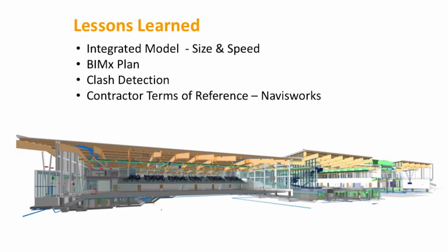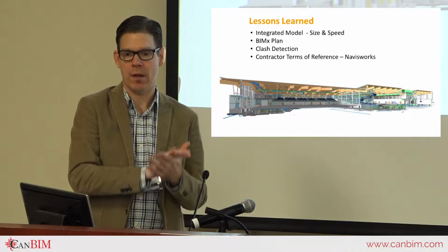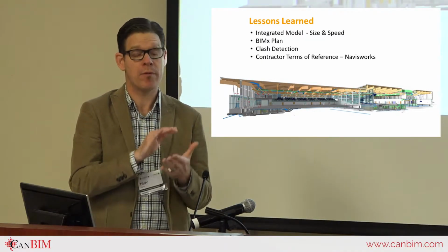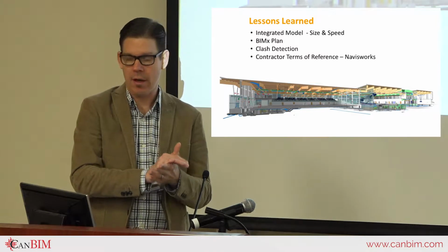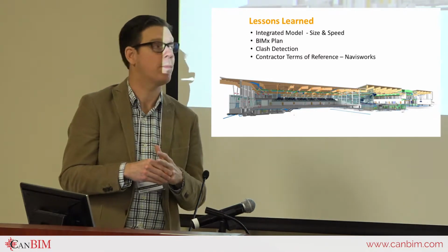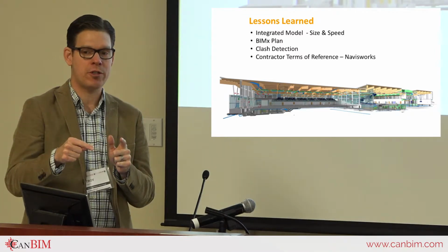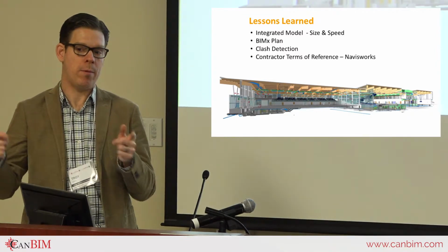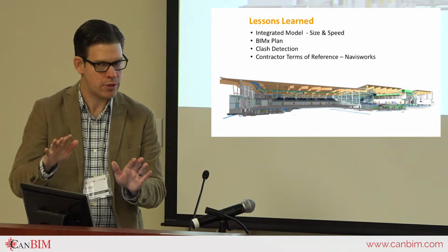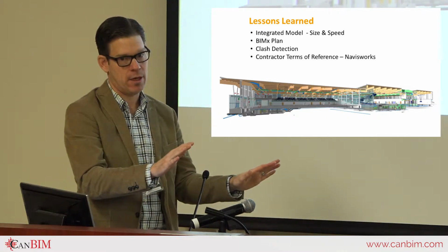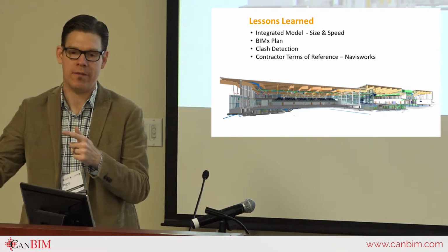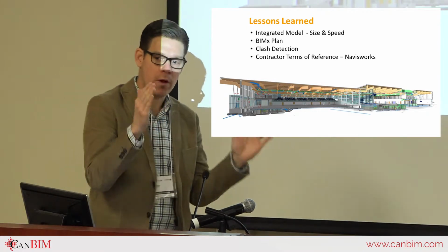This was an interesting one because the contract for this job for us as the design team was to produce 2D documents. The model was not part of the contract. We provided the model to the contractor to help them along from a visualization perspective. But what happened was it ended up asking more questions about things in the model. And we would have to tell them, the model's not the contract. The documents are the contract. You can't say to us, well, I can't find this in the model. That's not the point. What's on the documents?